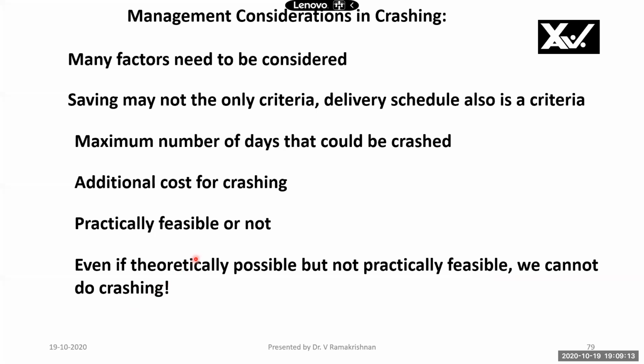Therefore, crashing has limitations. There is an objective that we need to deliver on time. That is a goal. In order to deliver on time, we'll have to monitor the project progress. When we monitor the project progress, if there is a delay, then we'll have to start crashing. At the time of crashing, we will have to see the additional costs incurred as well as the delivery schedule to be maintained. These are all the things you will have to remember while doing crashing.